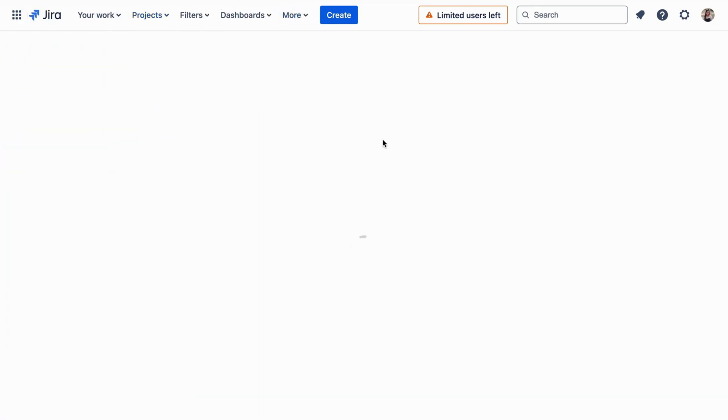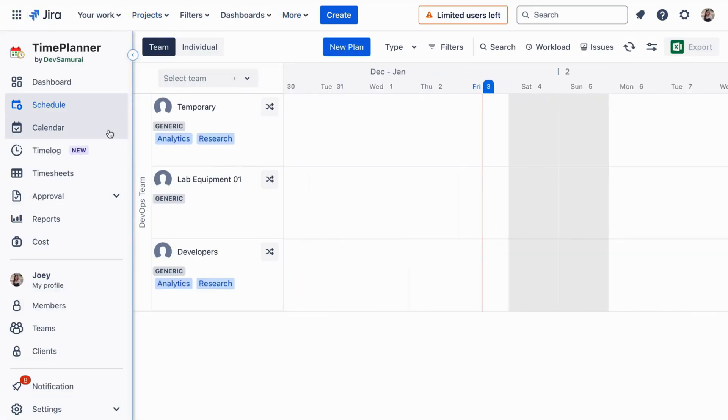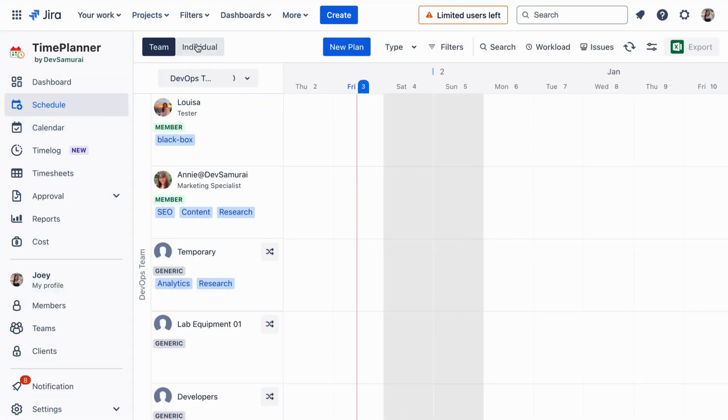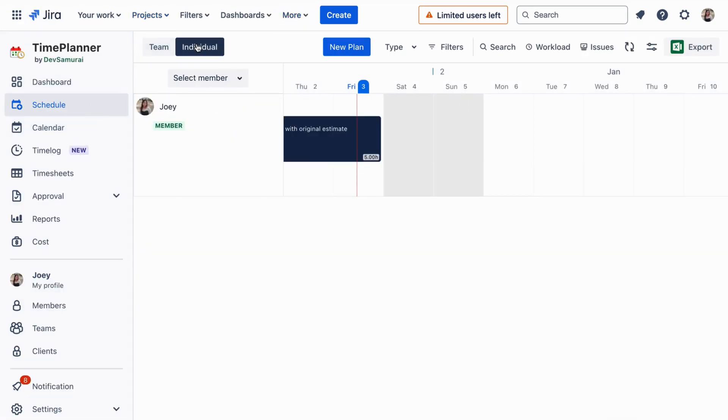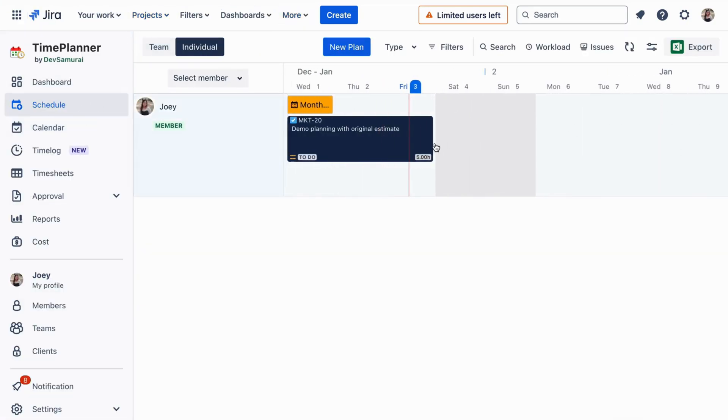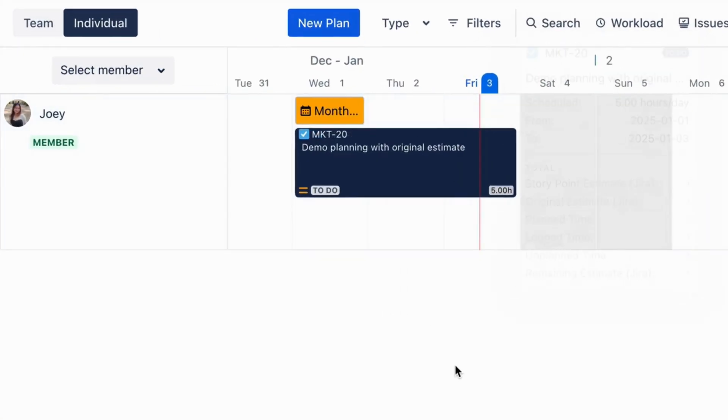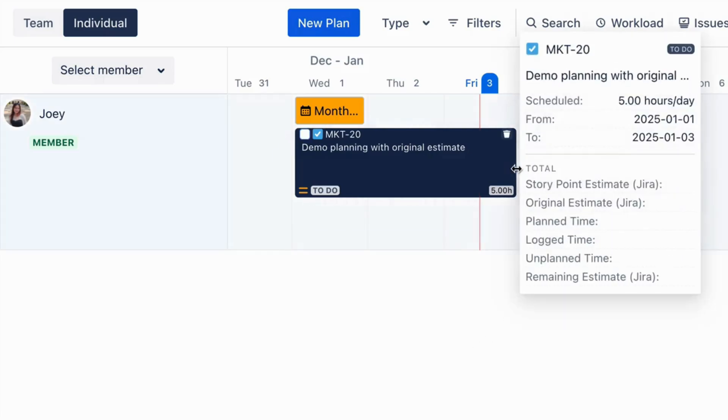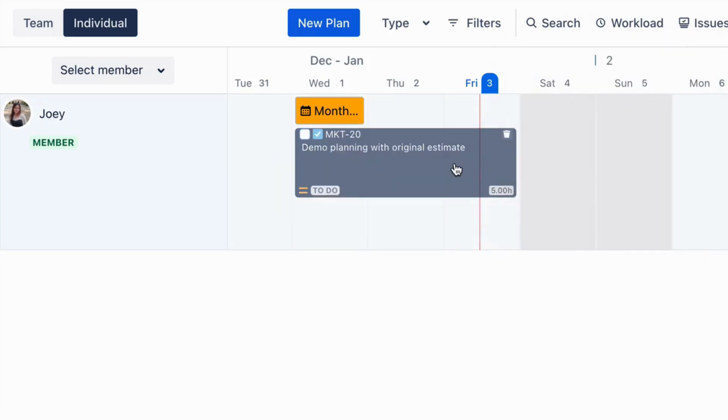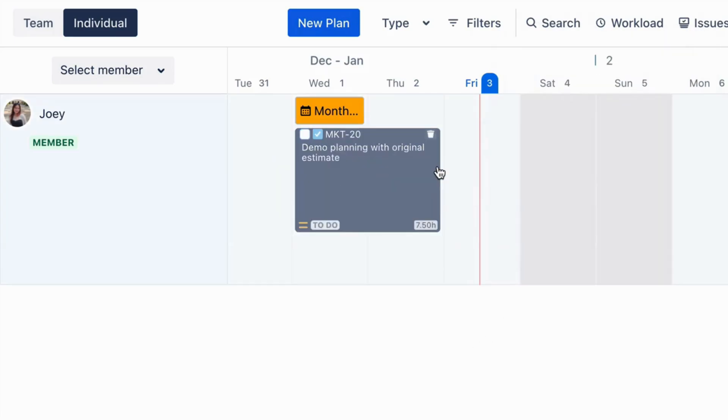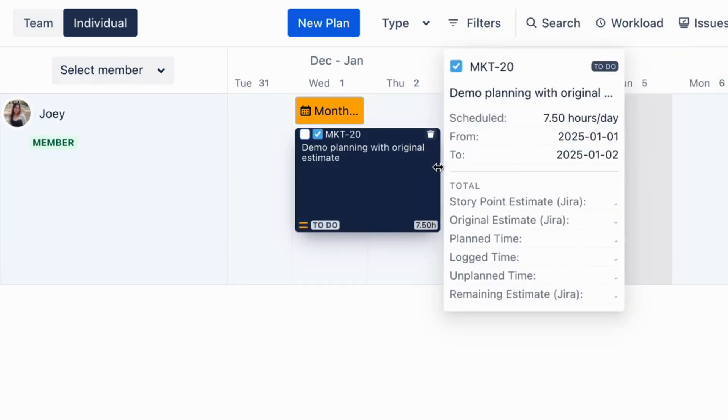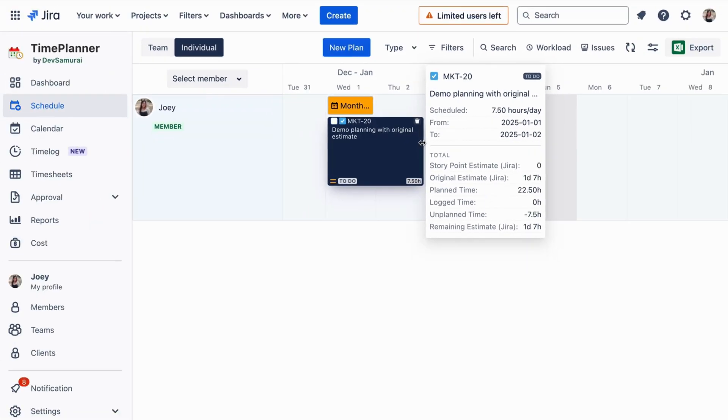Then, in our app, your schedule board will automatically distribute hours across the duration. Drag and drop adjustments will instantly recalculate scheduled hours, keeping everything aligned with the original estimate.